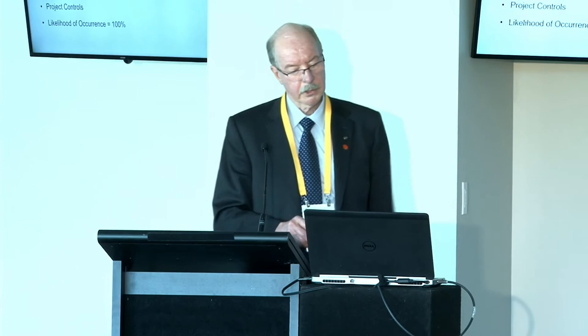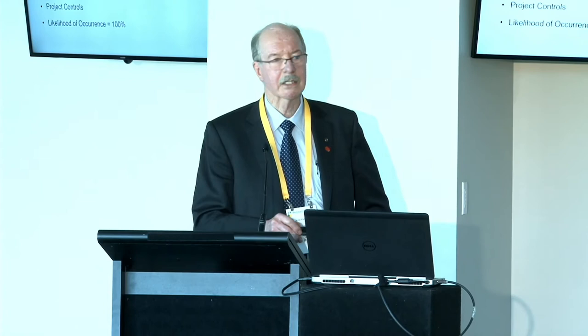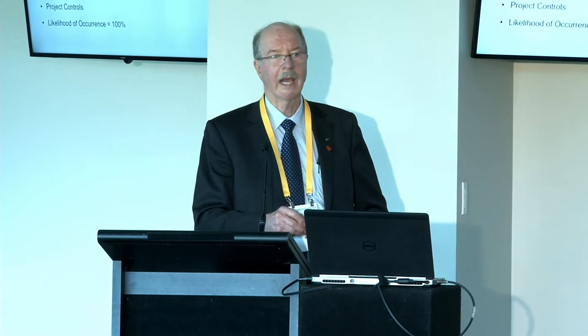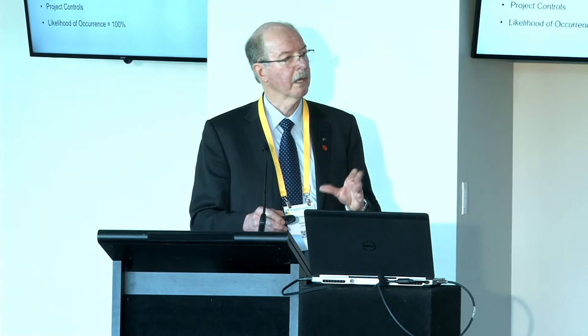In scope definition — the first area — my recommendation is to use the Construction Industry Institute's Project Definition Rating Index. It's a tool that separates into three sections, 11 categories and 68 elements that are questions and prompts to get you to look at scope definition. It's a 1,000-point system and it's recommended you try to get that down to 250 to 300 points.